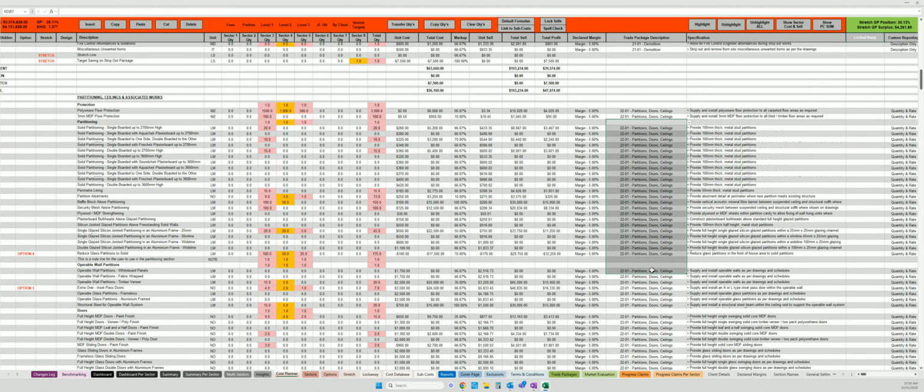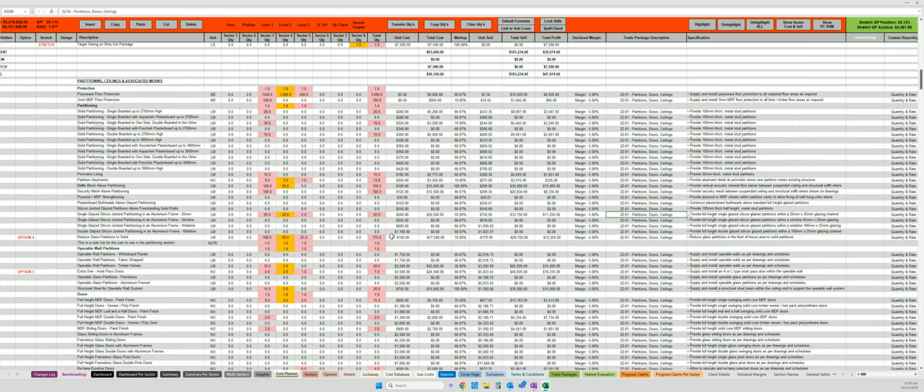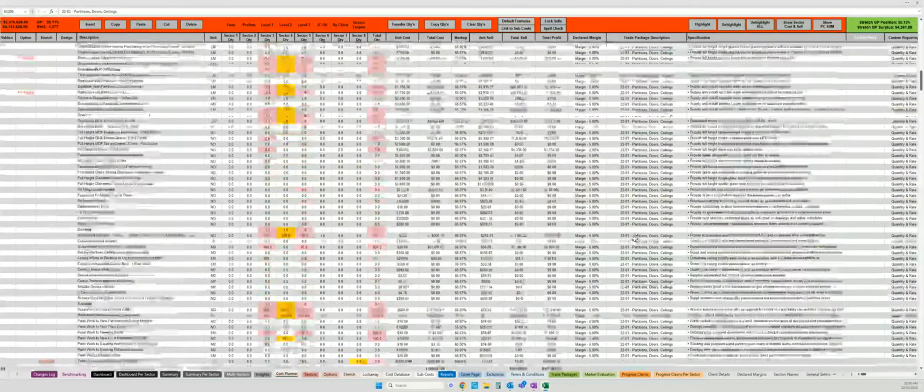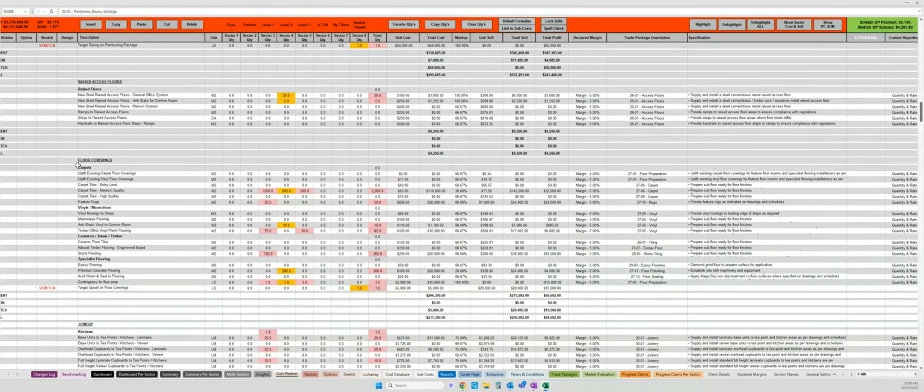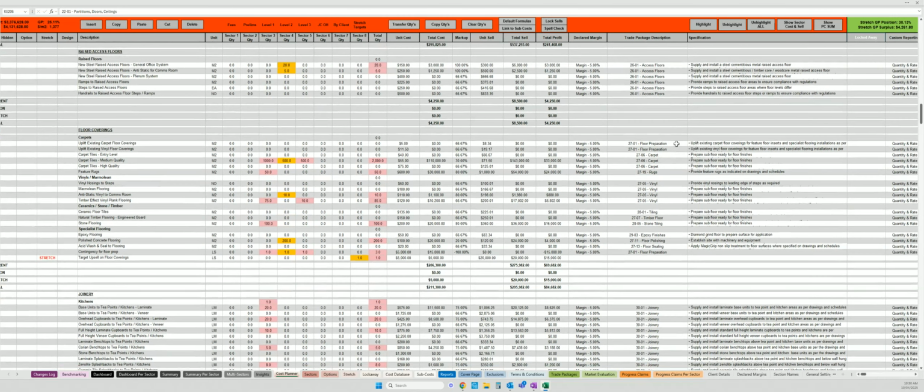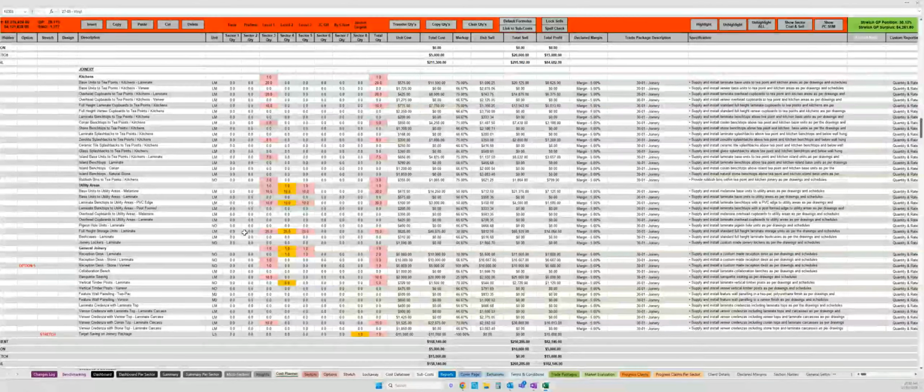And this is where you would tag lines into packages. So in this example, everything is packaged all together in this section, but I might have an area where I have floor coverings, where the prep and the carpet, I'm getting the rugs from a different supplier differently from the carpet, the vinyl's coming from somewhere else. I have an area where joinery might be coming from one package, but I might also separate high-end joinery from standard joinery into two separate packages, and I can adjust those packages.